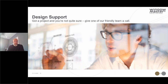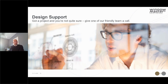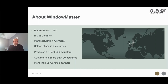Window automation straddles disciplines — it's part of the architectural package on the windows, part of the main builder's package with the window fabricator or facade specialist, but equally there's electrical cabling as part of the M&E design and subcontract package, and potentially the BMS as well. With so many different parties involved, good coordination is really important to make sure everything connects as expected with no hidden gaps, extra costs, or on-site issues. We really encourage anyone involved with a project with automation to give one of our guys a call — we're happy to support the different parties involved and ensure the best outcome for everybody.